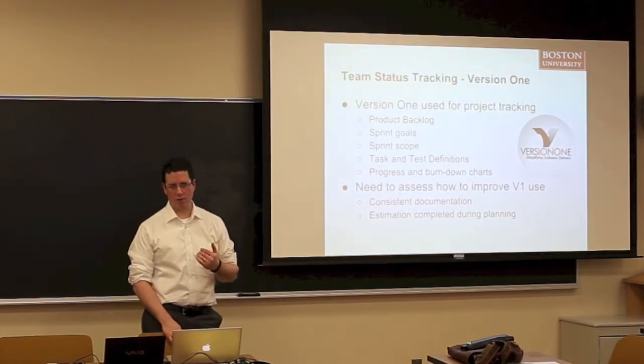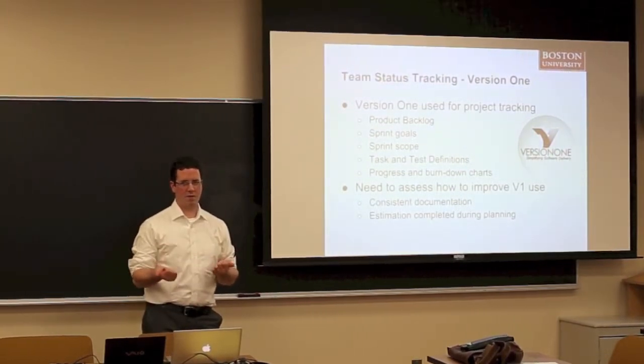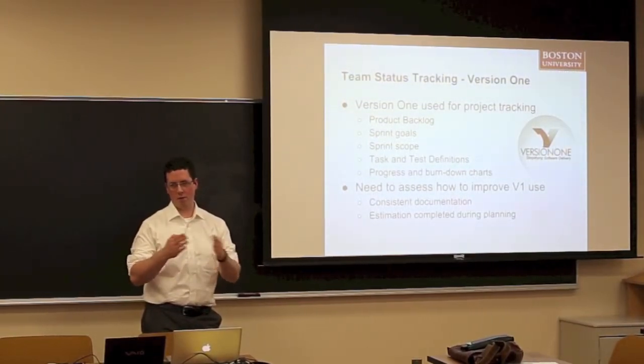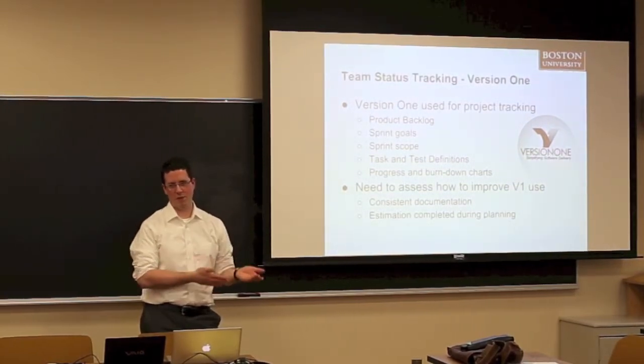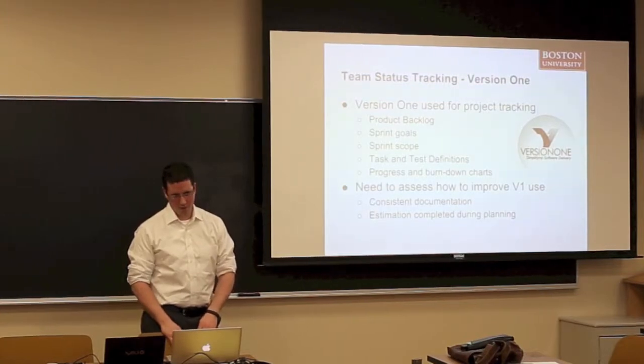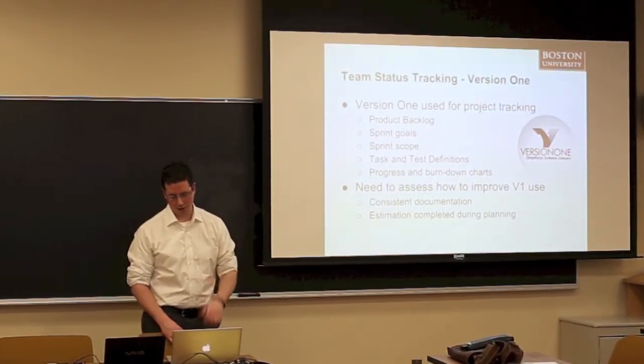And the other thing we noticed is that a lot of times the task would have been done and then it didn't get tested, and it doesn't show up in the burn down until both of those activities are done, or both are done and it just hasn't been logged yet. So it becomes pretty difficult to get the tool to mirror reality without being consciously in the tool all day.